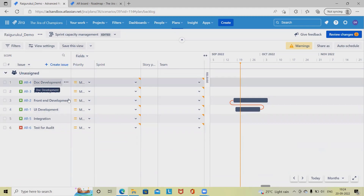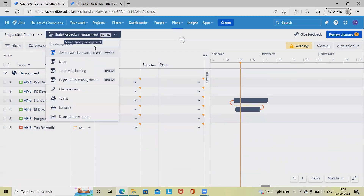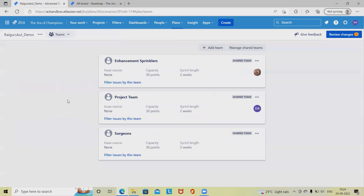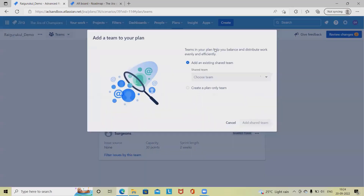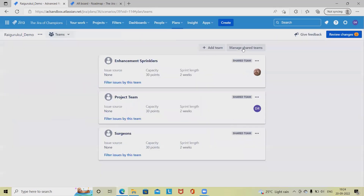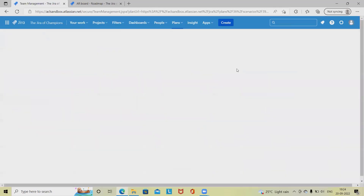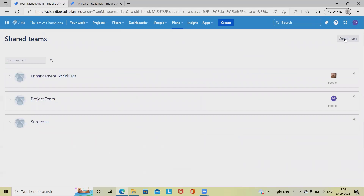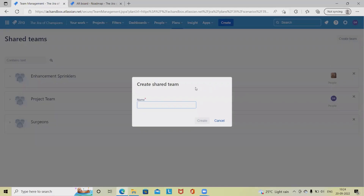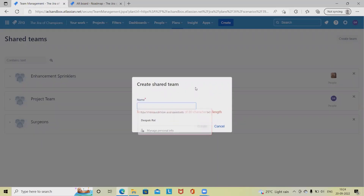If we want to add a team, we first have to navigate into the Teams section. From here we can create a team or add an existing team. If we want to create a new team, we click on 'Create Team'. Let's say I want to create a team for DevOps activity.